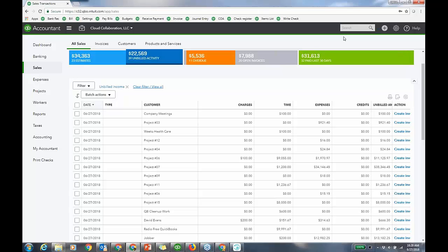Change orders, I can create an item for that. But a budget to actual is already in QBO. That's what I'm about to show you. But the estimate to actual, the default report that's created from the estimate right away, that's not yet in QBO. So again, if I have a lot of jobs every week, I don't want to keep creating budgets as a workaround, because I'm not going to have the time. So I'll go and plug in with Notify and have that visibility as soon as I create an estimate. All right, but desktop has the estimate to actual reporting. In QBO Plus, the workaround is to create a budget by customer.